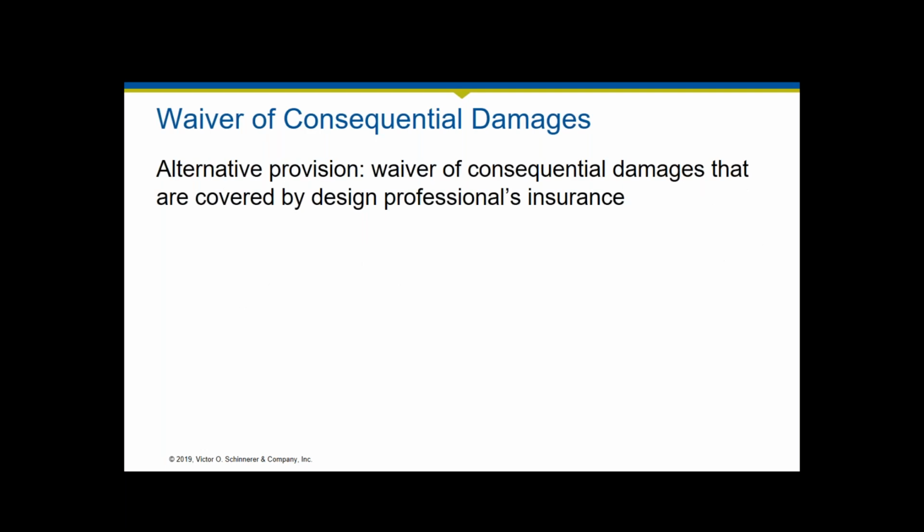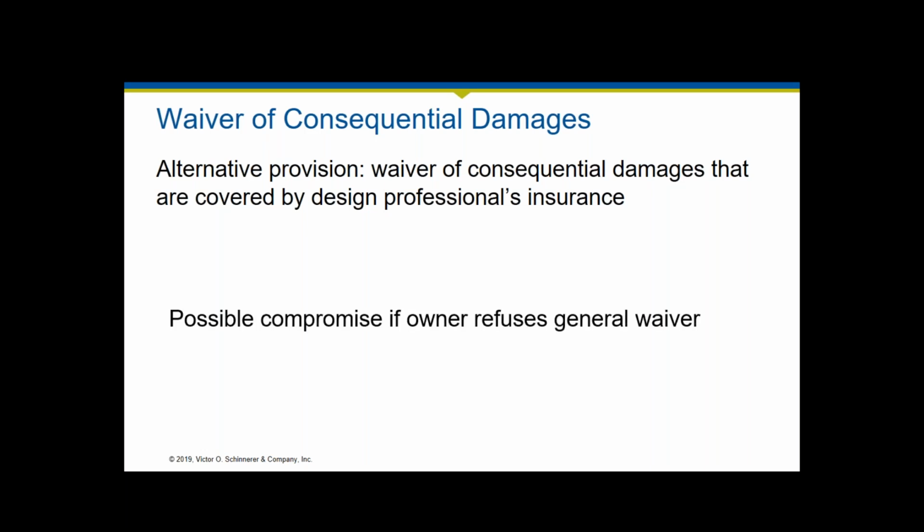Now, obviously, you may not get what you want, but if the client doesn't want to give you a general waiver, you could say, hey, how about we waive consequential damages that are not covered by design professionals insurance. So this way, you at least know that you have insurance coverage for consequential damages.